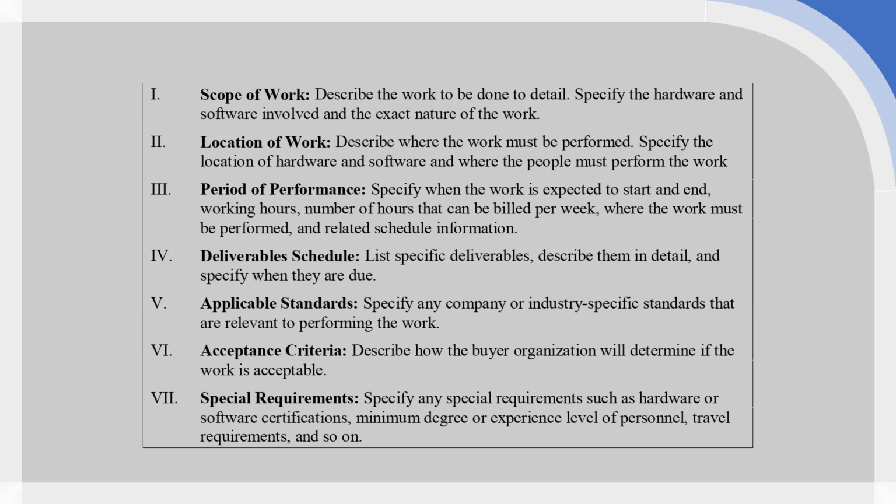This example, or really a template, is pretty comprehensive, so it would cover things to do with labor input as well as material input. So it may be that if you're not fussed about the location of work, so you simply need a raw material, then your location of work section in the statement of work may simply just be specifying that it needs to be delivered to a particular location rather than where the work is to be carried out or the materials to be harvested. It may be that you require materials from a particular location or materials from a particular country, but otherwise you still need to specify the delivery point or the handover point as well.